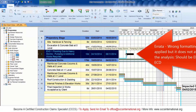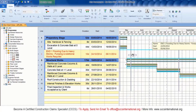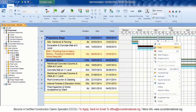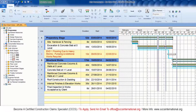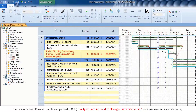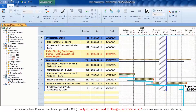It's one of the benefits of using ASTA — the presentation is much better than MS Project or Primavera. Note that we made a minor formatting error, but it does not affect the overall analysis. Now it's time to insert this delay event into the excavation and concrete slab activity. We will split the affected activity by duration — taking that duration from the Excel file — then insert the delay event between the activity and link them by finish-to-start logical links. Reschedule the entire project, and you can see the program has been negatively impacted with a revised completion date of the 18th of February 2015.